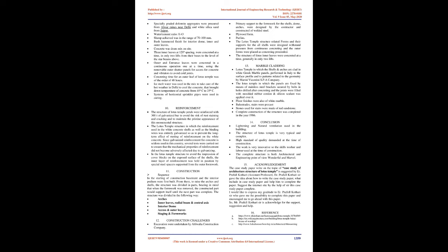/Lotus_Temple_const_6.jpg. In the Lotus Temple, full-scale mock-ups of the bottom surface of each of the shells were first made at ground level and the architectural patterns marked on this surface. 9. Concrete. In the Lotus Temple all the ribs and shells up to radial beam level are in white concrete.